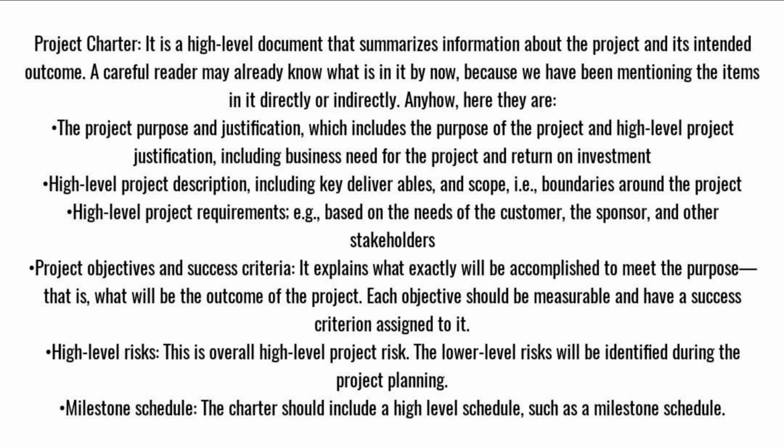Project objectives and success criteria. It explains what exactly will be accomplished to meet the purpose, that is, what will be the outcome of the project. Each objective should be measurable and have a success criterion assigned to it. High-level risks. This is overall high-level project risk. The lower-level risks will be identified during the project planning. Milestone schedule. The charter should include a high-level schedule, such as a milestone schedule.